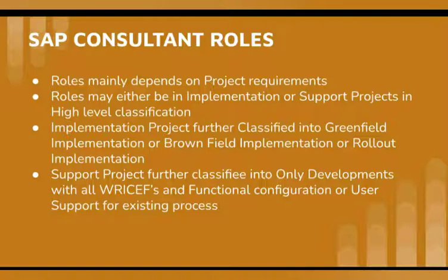Once a change request is created, the consultant can discuss with the business users, collect the requirements, and prepare the functional specifications. The functional specification documents everything we need to perform and the changes we need to make. The ABAP person will also prepare the technical specification document. As per the development project, we need to closely coordinate with the ABAP person and do all the testing.